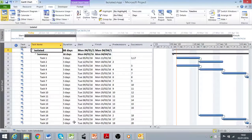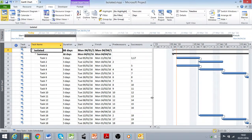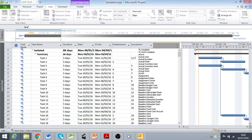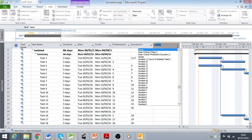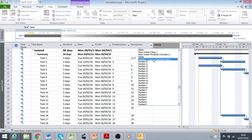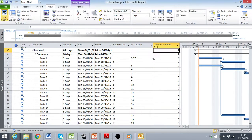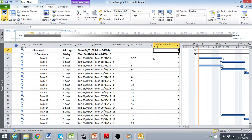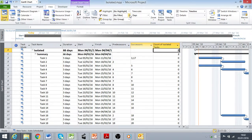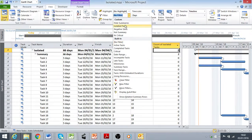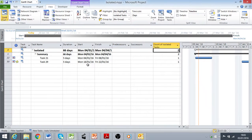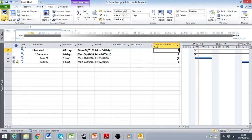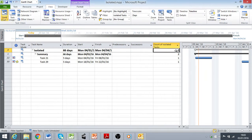The next step then is to display my custom field with formula in the table. So I'm going to add a new column, choose number 1, and that's telling me that I have a total of two isolated tasks with no predecessor or successor in this project. And if I just apply the filter for isolated tasks, I should see that those two activities, those two tasks, without a predecessor or successor, have the number 1 in my custom field and is summarized up to a total of two for the project.